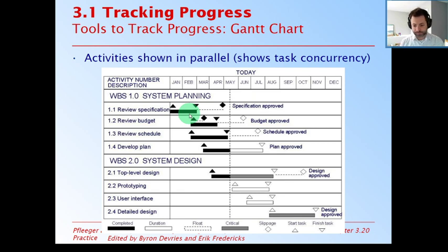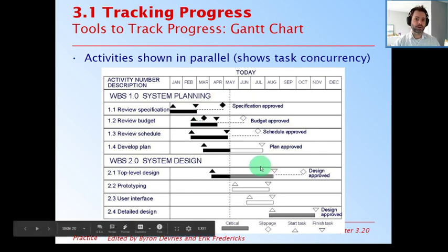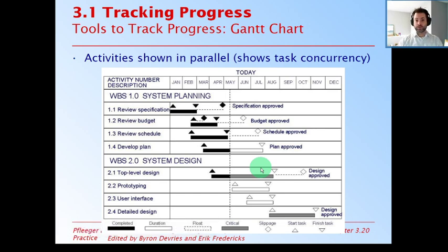Now, it is fine for simpler things, but it can become very cumbersome to work with over time, as these things get very, very bulky. Just kind of pros and cons here. Also keep in mind that if you're working in an agile environment where things are going to be changing on a daily basis, having a graph that's set in stone of, okay, today you are starting on the GUI and you are finishing that by the end of the week, whether you like it or not, that's not a great way to do development in a flexible environment.